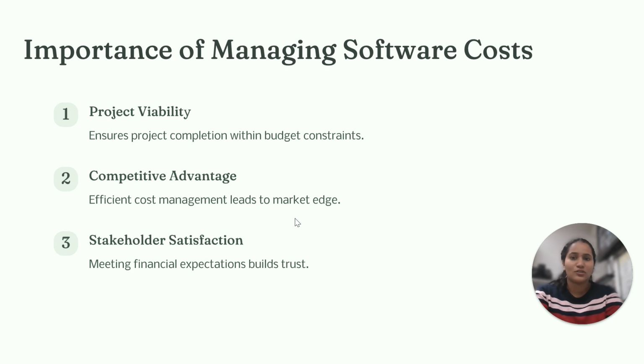Then comes why maintenance cost can be more expensive than initial development. As initial development is a one-time process, maintenance cost may be higher compared to the initial development due to continuous bug fixing, the updates which are requested by the customer, adaptation to new environments, and evolving users. These activities are unceasing, unplanned, and require more effort in comparison with one-time development during the lifetime of software.